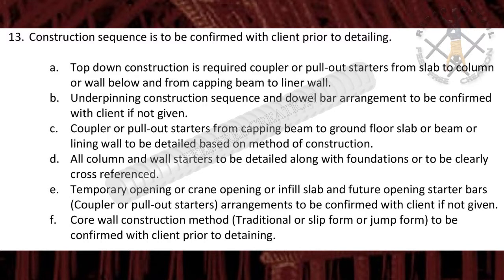Point 13. Construction sequence is to be confirmed with client prior to detailing. Top-down construction requires couplers or pull-out starters from slab to column or wall below, and from capping beam to liner wall. Underpinning construction sequence and dowel bar arrangement to be confirmed with client if not given.